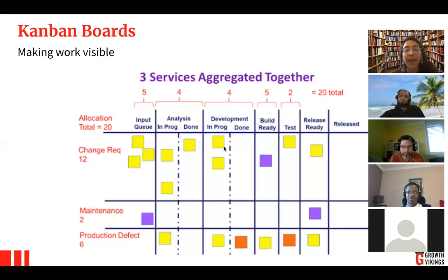Yes. So basically, you do have daily meetings every day where you can review if there was a task or anything that becomes obsolete and we need to update it as a team. Yes, so you do have that. And the other thing is that you do have priorities. As I mentioned before, the cards have prioritization: high priority, medium priority, low priority. It allows you to take care of those that are more relevant first. The important thing is that as you take care of the most relevant first, you keep the limit of work. Yes, just to let you know, the important thing is just to keep the limit of work.